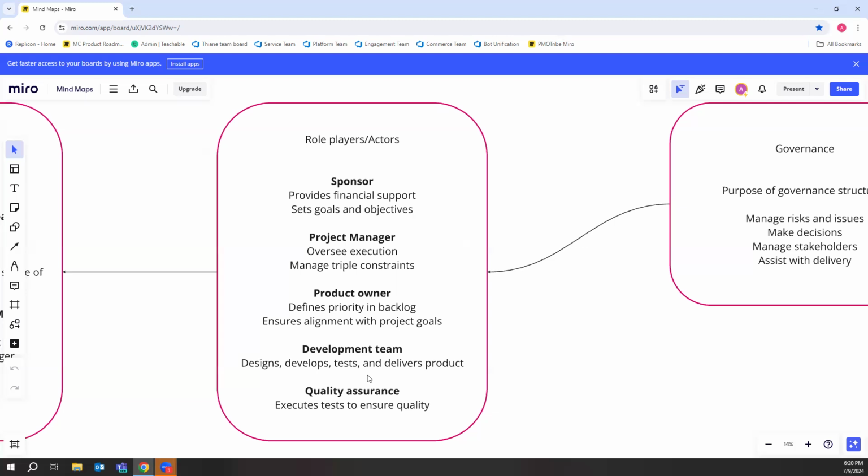When we start getting into the planning phase, I'll show you how to identify when we're going to need them, but make sure for those time periods, because we don't necessarily need them all the time, but when the team needs them, that they are available for us. And the planning is very important. That's where the real skill of project management comes in, is to identify when we're going to need these skills and to be able to negotiate the availability of those people during those times so that we don't get delayed when we need them, right? And they don't become blockers for us.